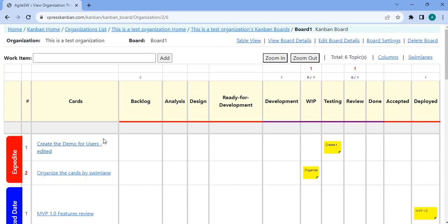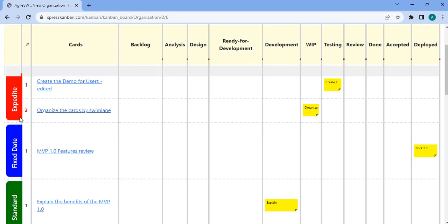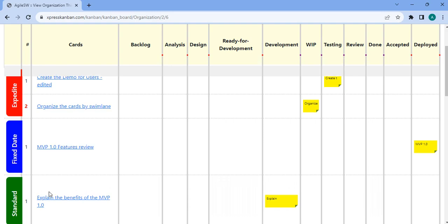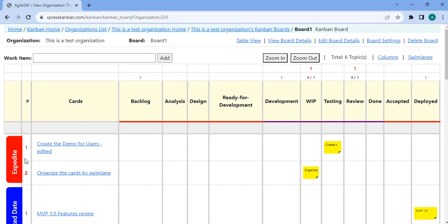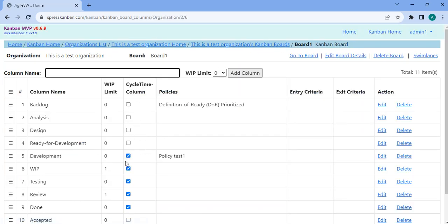So here we actually apply all the Kanban practices. The main idea is to have WIP limits. We have the columns to declare the flow, like how we saw in the Kanban six practices. There is a swim lane to explain the different fixed classes of service. And then we also have the columns. You can edit as many columns as you want. You can actually add cycle time to demonstrate the cycle time calculations.